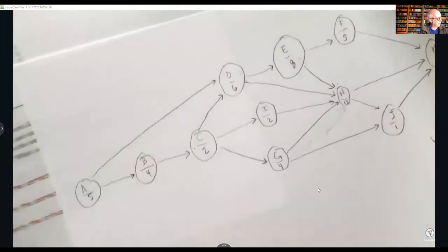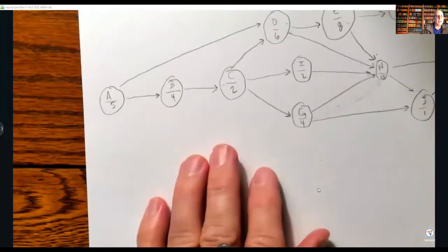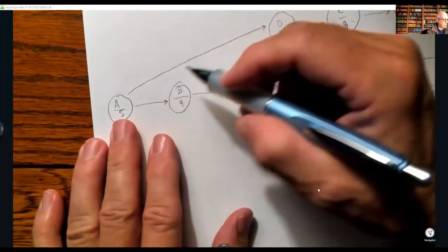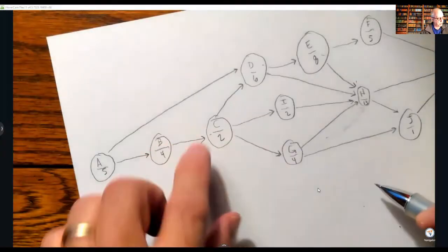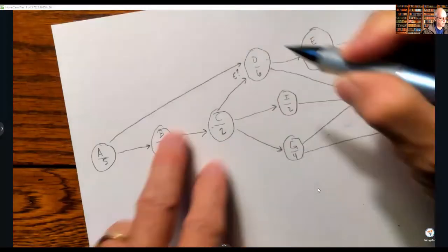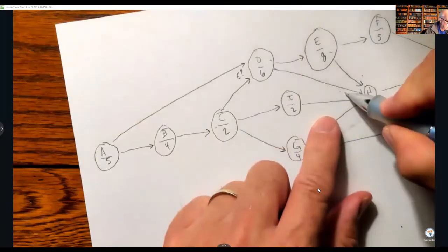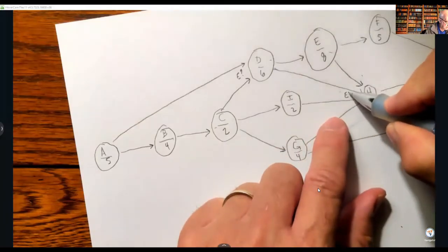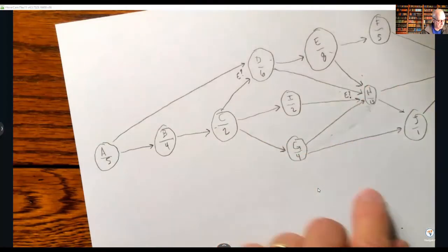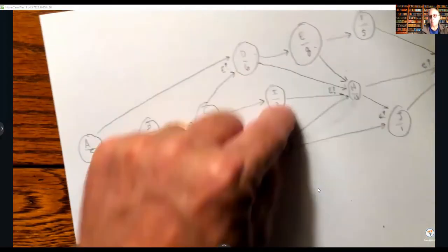So I'm going to go ahead and put this aside and focus on the big thing. I got this little ridge here, so sometimes that causes me problems. I start off and I'm going to do my E's. And oh, wait a minute, I've got to make my decisions. I have 2 arrows coming in there, so I have an E decision. 2 arrows coming in, 3 arrows coming in, or 4 arrows coming in. I have an E decision here, here, and here. I have to make all these decisions because some arrows are coming in.